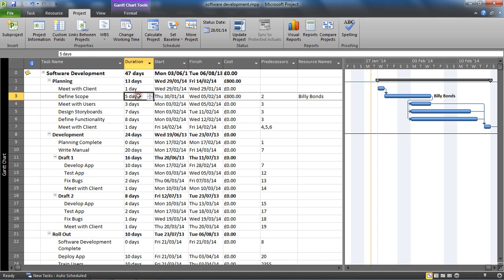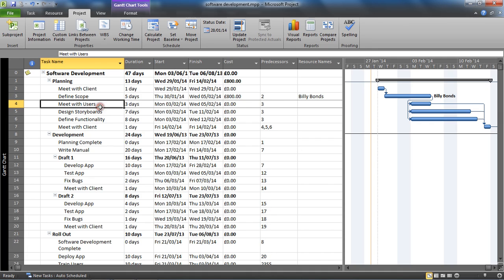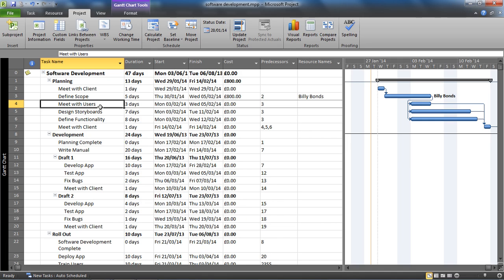Five days making 800 pounds. Now what I want is I don't want Billy doing eight hours a day for his 40 hour week where he's also going to do two hours overtime every day. Overall he's going to be doing a 50 hour week - eight hours per day plus two hours overtime, ten hours per day over five days. That's what I want to say to Project.